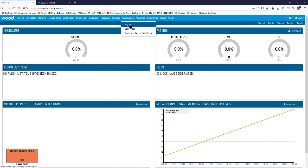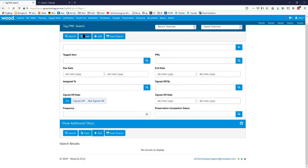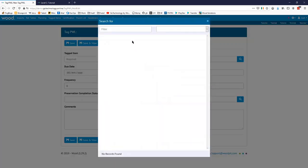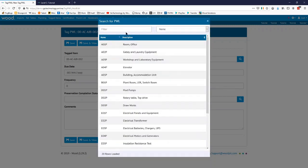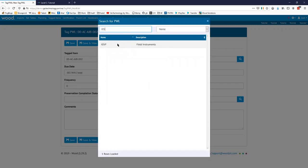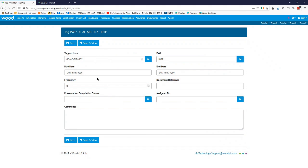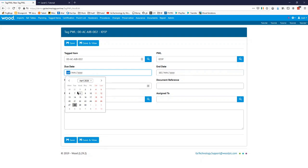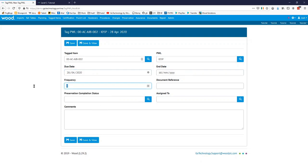So we're going to go into Preservation and go to Tag PWLs. We're going to add one because there isn't one in there at the moment — again you could do this via imports as well. We'll choose this tag item here and we're going to choose an IO5P. We want to say when is the due date and when is the end date if there is one. For frequency — how often you want this preservation task done — if we wanted it done weekly we'd say seven, roughly every month we'd say 28. Let's say it's every five days. We'll go save and review.